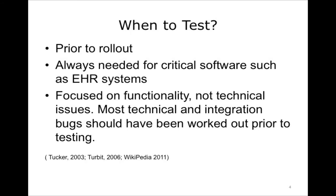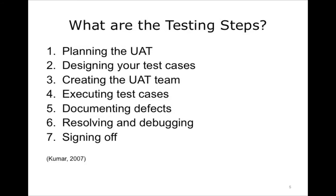Since the focus of user acceptance is on the system's functionality, the vendor should have rectified a majority of the technical glitches in the product prior to UAT testing. This is equivalent to a manufacturer doing product testing after a part comes off the assembly line to ensure the product functions to its specifications. User acceptance testing should be carried out in a test environment that mimics, as closely as possible, the actual work environment where the EHR will be installed. In general, there are seven steps when performing user acceptance testing.